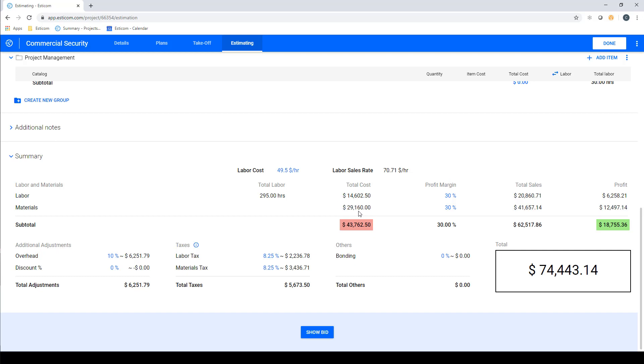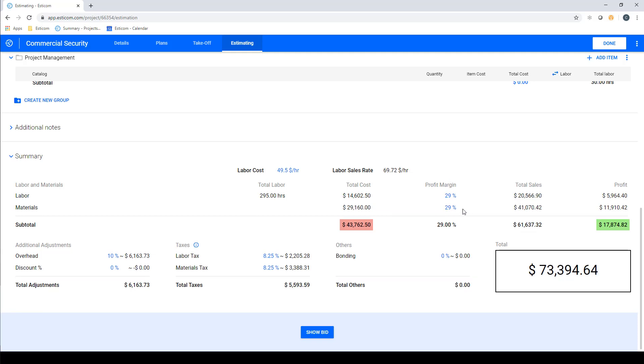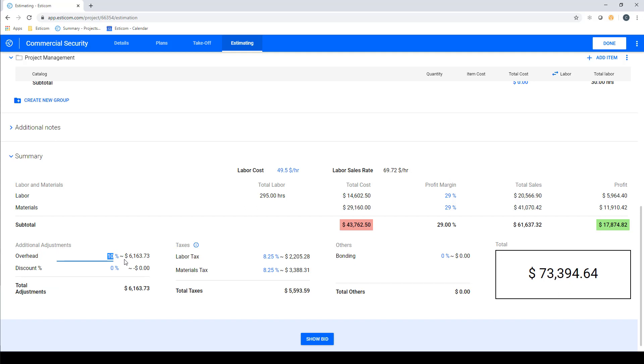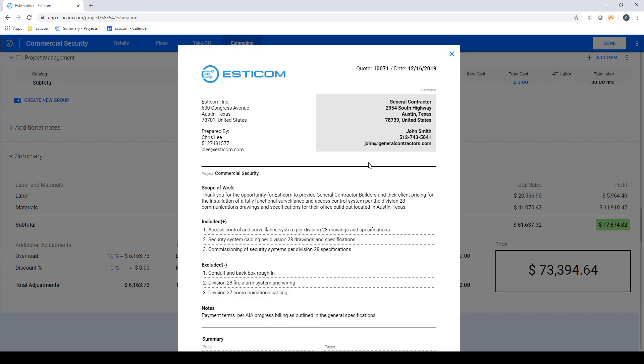Below that, you can see our total material costs, and in red, the total estimated project costs. We can adjust our profit margin, and below, we have some additional adjustments that we can make, which include overhead and sales tax. At this point, we have our sales price, which is depicted here, and we can click show bid to review our customer-facing quote.